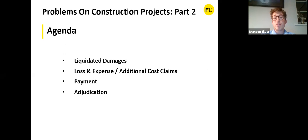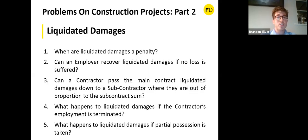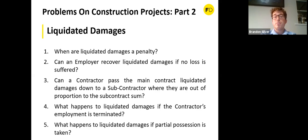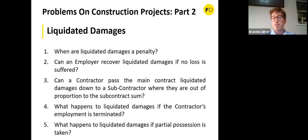In each topic I'm going to talk about some of the main questions that crop up. Firstly, what is liquidated damages? Liquidated damages is a fixed or determined sum agreed by the parties to a contract to be payable on breach. In a construction contract, you normally see liquidated damages when the contractor fails to complete by the completion date — for example, three thousand pounds per week for every week or part thereof that you are in delay.